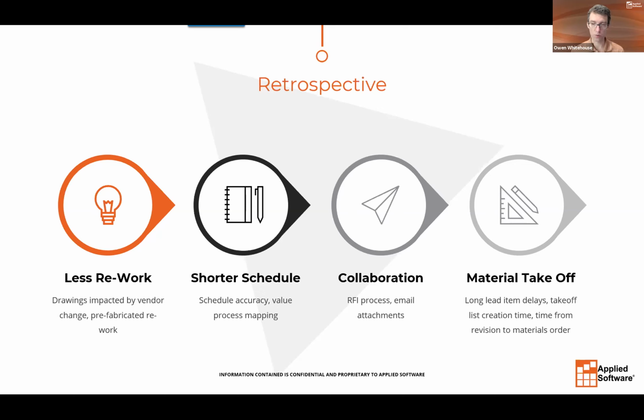companies and individuals you're working with, say your construction managers and your site superintendent, all that communication, if you're correlating that to your dollar value, you can very quickly get an overview of how good your initial project documentation was, how tight your design was. Because if there's tons of communication on a small project, that to me says, well, we kind of missed. Our documents weren't very good, our drawings weren't clear. A lot of RFIs came in.